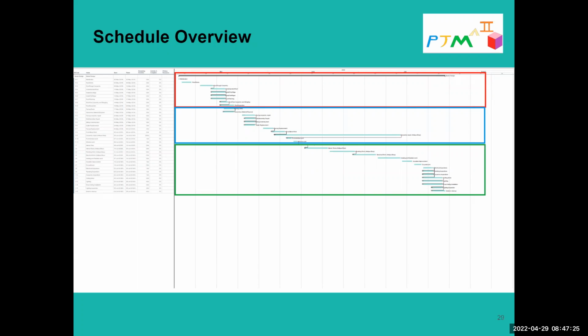But once we complete that, we want to move on to the siding and then wrap it up with the interior. This is supposed to be semi-modular because we have the interior starting work some point in June. But we understand that a lot of contractors up here won't even do work on interiors during the summer, just because they want to do the maximum amount of work throughout the year and they can't do exteriors during the summer.